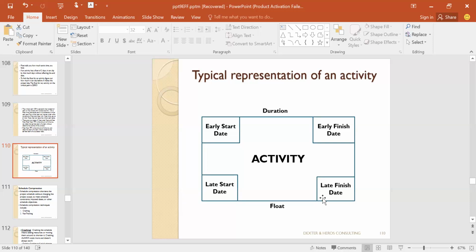Sometimes things just happen in a project and you're like, oh boy, what can I go do? You say, hey, you, can you stop what you are doing? Why did you suspend the activities of other people, your team members? Because you discovered that what they are doing has some float and can be delayed. But this one, I will not afford delay. Any activity that cannot be delayed in your project is called a critical activity.